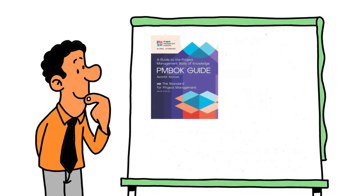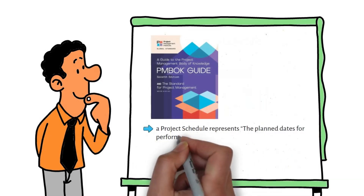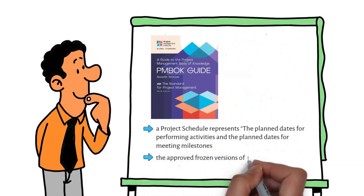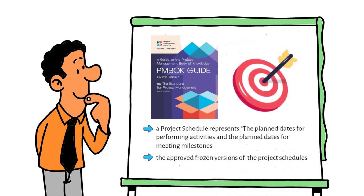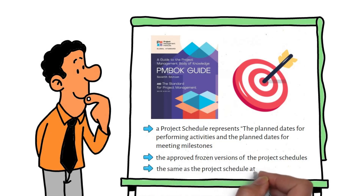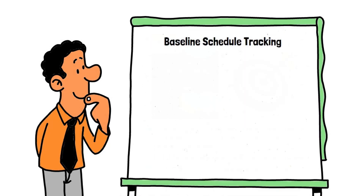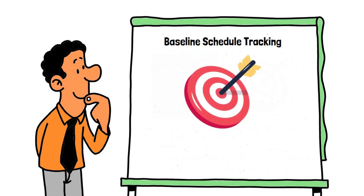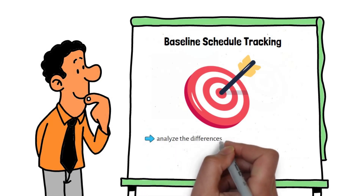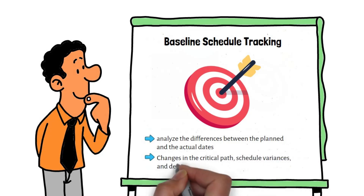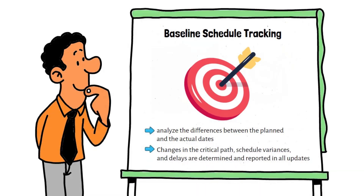According to PMI's PMBOK Guide, a project schedule represents the planned dates for performing activities and the planned dates for meeting milestones. Baselines are the approved, frozen versions of the project schedules. Before updating the schedule for the first time, the baseline schedule is retained as a target — meaning the baseline schedule is the same as the project schedule at the beginning. After approval by stakeholders, schedule tracking is used to analyze differences between the planned and actual dates; changes in the critical path, schedule variances, and delays are determined and reported in all updates.